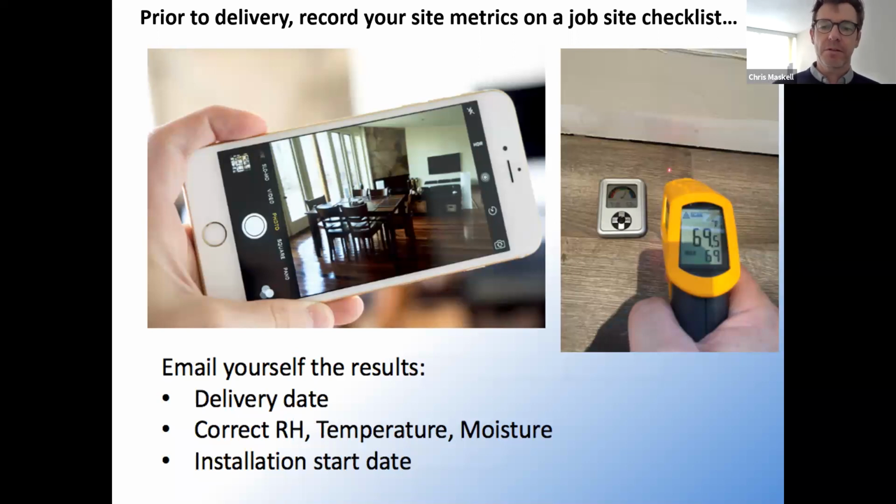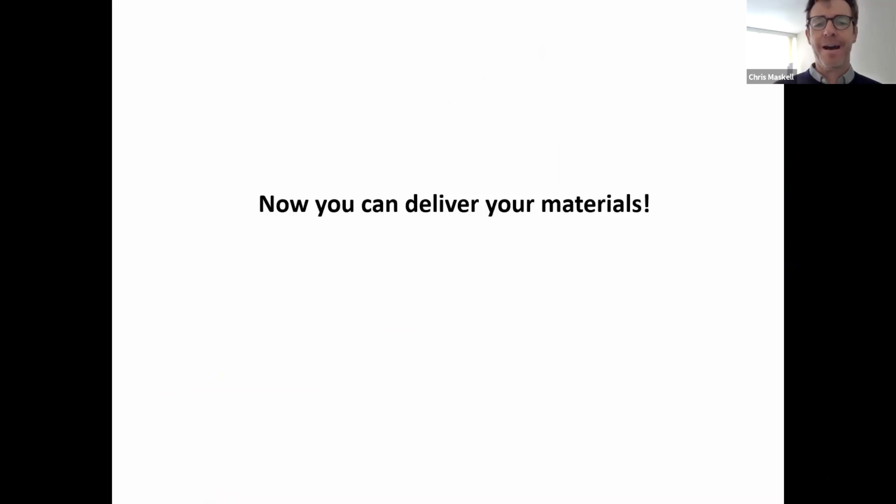Once you do that and you leave the site, a homeowner is responsible to continue maintaining those conditions. How can you as a floor installer be responsible? It defaults to the building owner, but you do have to be able to prove it. And hearsay, or you saying I did that, is not enough. You've got to be able to show it with photographs and evidence. Now, finally, you can deliver the materials.